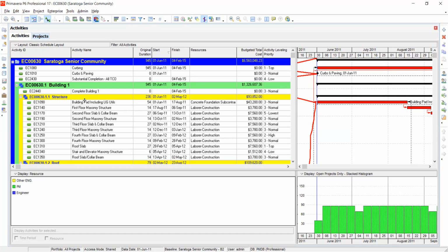There is over allocation, but it depends on the way you're viewing it. For example, if you over allocate resources on a particular activity, there is also another case where a particular resource has been assigned to a number of activities. So you are exhausting resources. You have one resource, you've given it very many activities. Then another case is you have one activity, you've given it many resources. So we want to avoid those two.